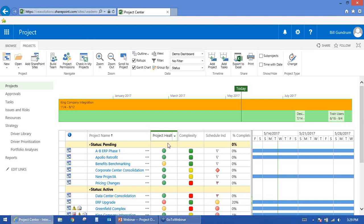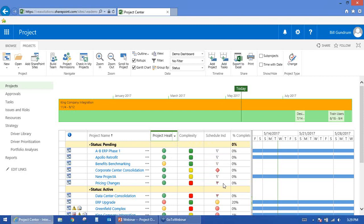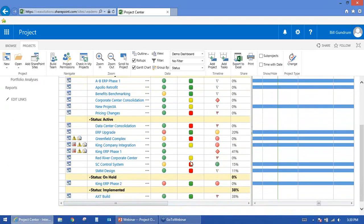In this dashboard example, we have a Project Health field — a subjective red, yellow, green status that the project manager can update. Complexity is rated high, medium, or low. The Schedule Indicator uses different icons comparing projected schedules to the baseline: a white flag means no baseline set, a red flag means no baseline but it's past due, and other symbols indicate how many days late. Yellow means one to five days late; red is more than five days. These are formula-based, similar to Microsoft Project formulas, just executed at the enterprise level and pushed to everyone using the product.